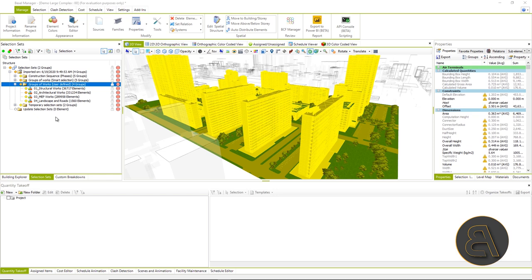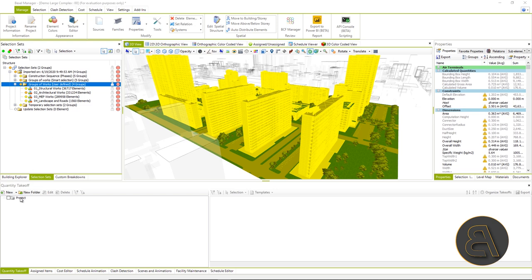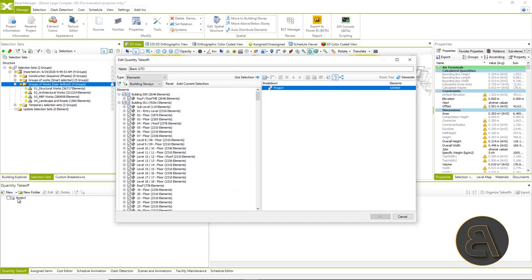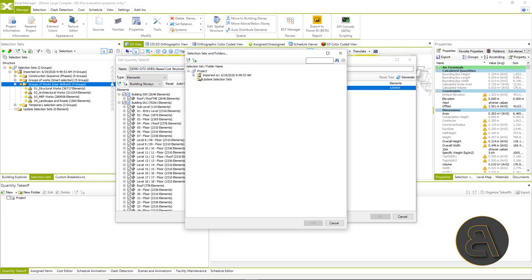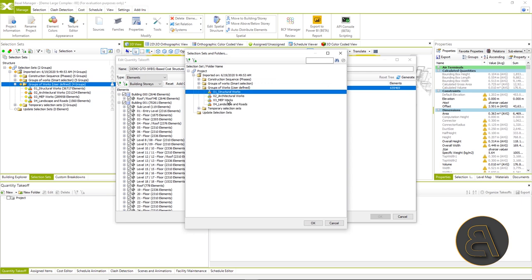We will use the group of works folder and selection sets within it as the initial selection of the whole complex for further work on creating dynamics. So this division has already been done in the model. And if we want to apply this principle to one of our models, we'll have to create a selection set based on families or work sets, most often by model sources, because mostly different professions are modeled in separate models.